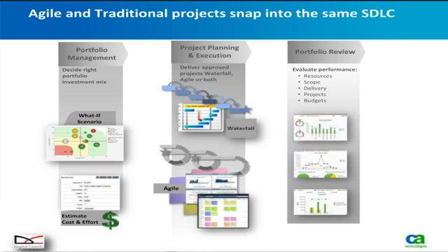And so what you essentially do is take that project out into, let's say, Microsoft Project. You do all your planning and scheduling. You check it back into Clarity, and all of the information is there in Clarity to be reported on and measured against, and to go through the funding and stage gates.